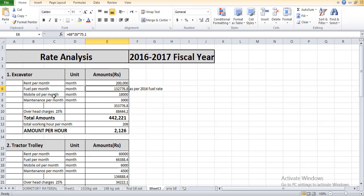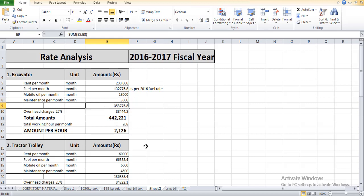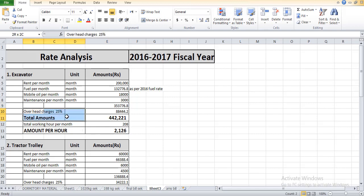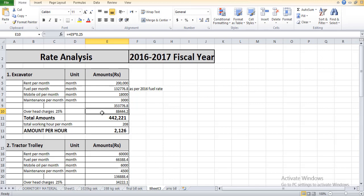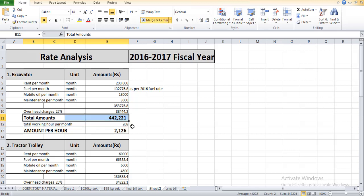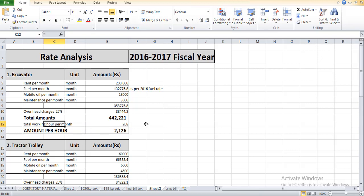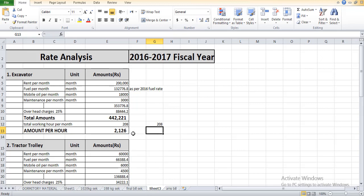The mobile oil per month according to the existing rate is 10,000, maintenance cost for excavator was calculated as 3,000. The total cost becomes 353,776 rupees. The overhead charges we take 25 percent which becomes 88,444 rupees. The total amount is 442,221. The total working hours per month is 26 times 8 which is 208. The amount per hour calculated is 2,126 Pakistani rupees.